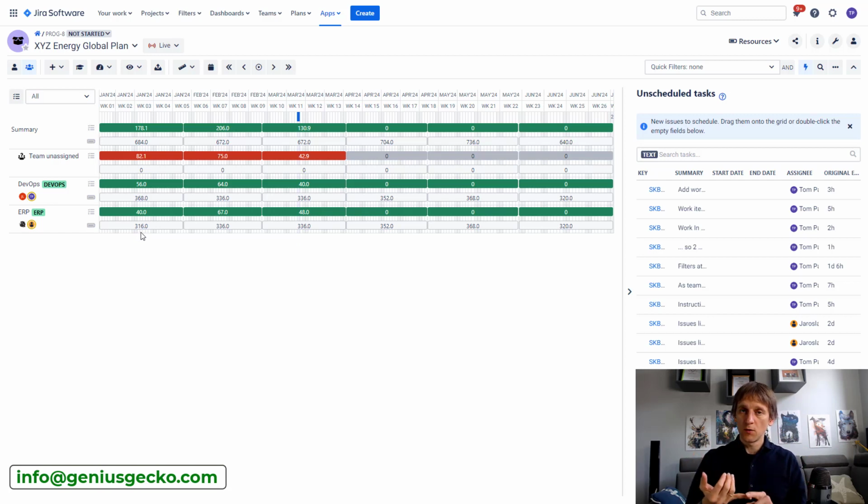So you can use workload plans to indicate, for example, how people are working throughout the week. You can use holiday plans to mark non-working days, the holiday days, the days that people are basically not available to work. You can work with absences for the people. You can work with additional modifiers to help you, for example, indicate that even though the person comes to work for 8 hours, 8 hours are not really something that we want to plan for, because 20% of that always goes to some kind of an overhead, right? So because of those possibilities, this module works a bit different.